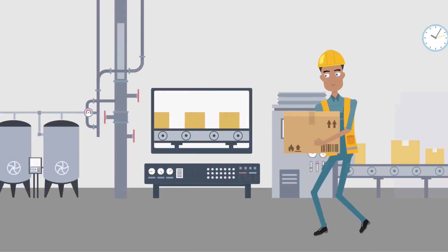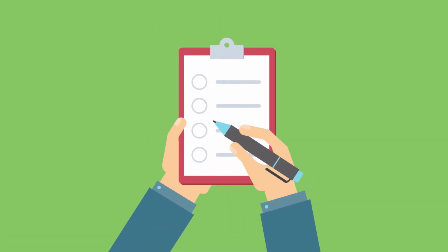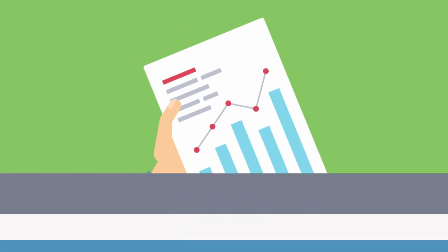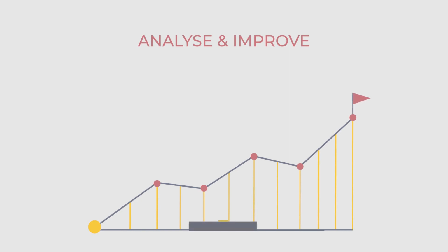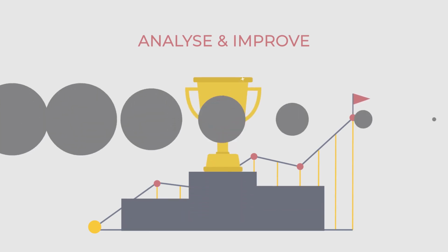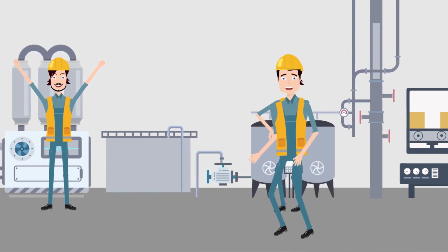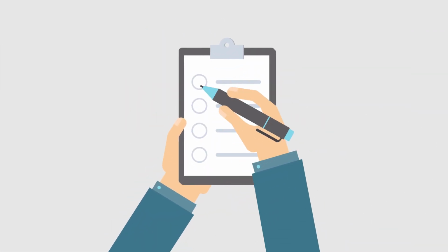As Jack completes his work, he keeps a daily record of the time he spends on the job and provides detailed technical feedback once the job is complete. That information is used to analyze and improve equipment performance, but also to improve the planning and scheduling process. Over time, Alex notices that his crew is getting more work done thanks to the good job plans and a clear schedule. As more work is done, the backlog slowly melts.